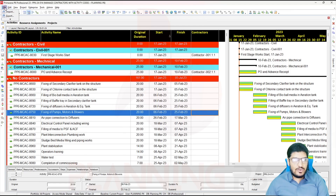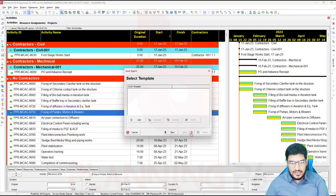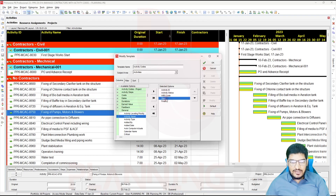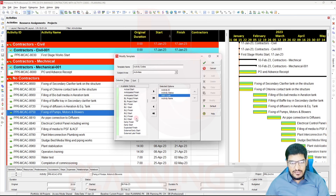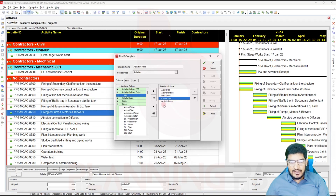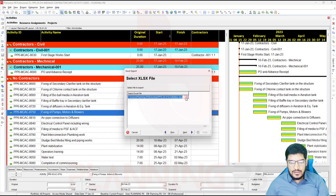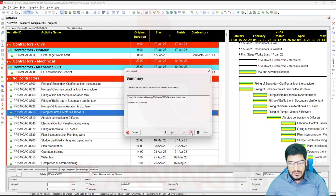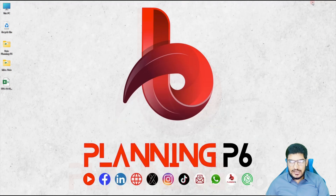Now I will go to export the file into Excel. Activities, Next, then export it. I will add the template for XLS — I will name it 'Activity Codes.' I don't want some fields; I do want activity name. Start and finish I don't need. WBS code will go by default. I will go for Activity Codes Global and Contractors. Next, give the location — I want to save on the desktop. Open, OK, then Open, Next, and Finish. Now you can see I have exported the file into Excel.